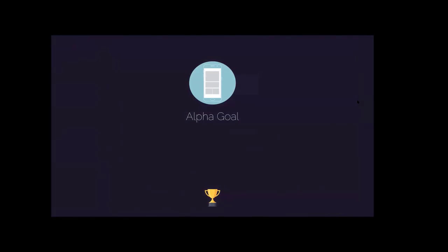Before you finish, one of the things that we do is, as this alpha phase is going off to the client for review, the developers have already started the beta phase. They are well on their way implementing the changes that are coming into the beta phase. So that is a very clean handoff. By the time all of the client feedback comes in from alpha, the developers already have those fairly well implemented in the beta phase.